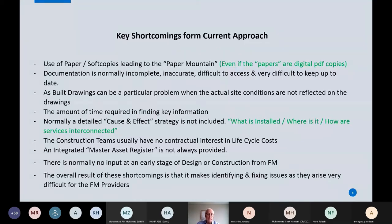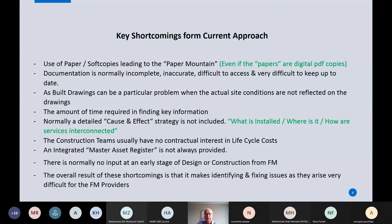I've rarely seen a proper cause-and-effect strategy outlined in handover documentation - in other words, what is installed, where is it, and how is it interconnected? Without that, when things go wrong it's very difficult to trace the problem, link it, and fix it. This can have dire consequences for the operation of a building or facility - you can lose an entire building for days at a time.